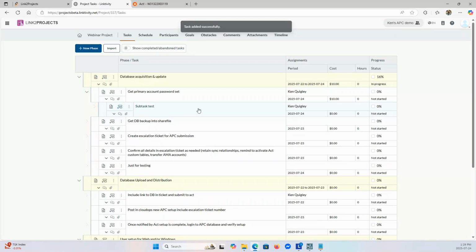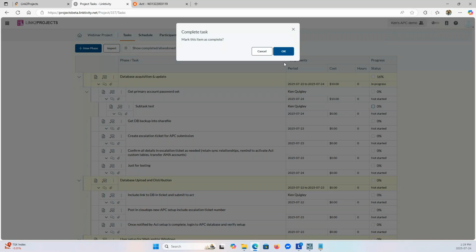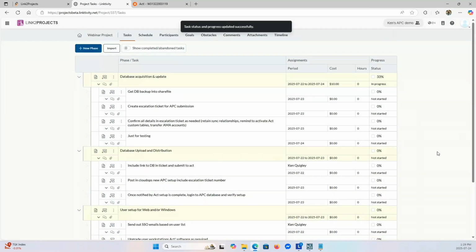Now, if you've got little tasks that require a sequence of subtasks to be completed, then this is actually pretty appropriate, where you can have a task here that's essentially a de facto phase, okay, but you don't want to treat it as such. And all of the percentage completed roll up to this, the total phase. But I'm going to clear this. You see that this jumped back in again. Every single time I added a task, you notice that the percentage changed.